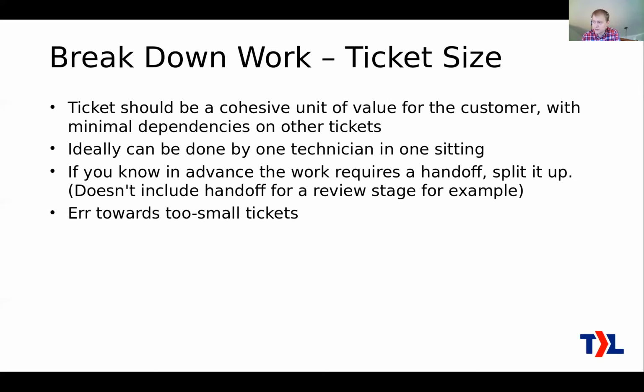When in doubt, make a ticket smaller. Okay, like I said, most people have a problem with making tickets too big. If you find out that you're just doing a bunch of clicking around because you do have too many tickets, it just doesn't seem like it's providing any value, certainly that can happen, and then go ahead and combine them. That's a less common problem though.